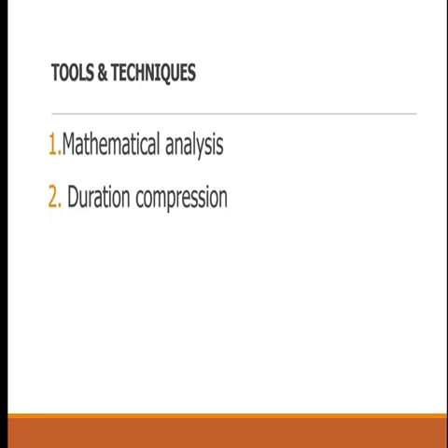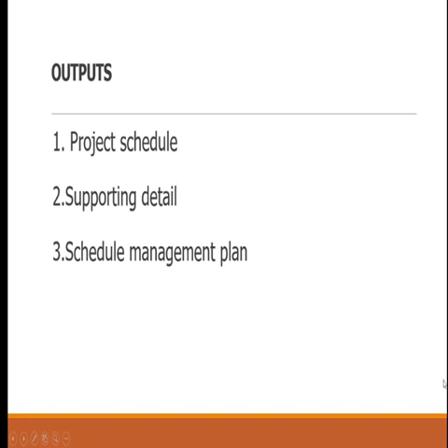It's like you are fast forwarding your video. So that is going to be risky. So if you want to do duration compression, please, you can crash. But if you add more resources, you may need to add more financial resources, because you need to pay more people to get the work done, or you need to use more machines to produce faster. Of course, we call it express in production. You've heard that word before. So that will help you to reduce your project time.